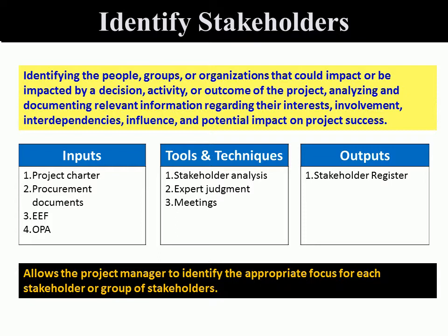So techniques include stakeholder analysis and expert judgment. People who have done this project before, or something similar, can advise and say, listen, you need to advise the health and safety officer. You need to engage persons from audit, or even the user group. Sometimes what we call the quote-unquote lower level staff may not be engaged or identified up front, and that in itself can add to some degree of risk.